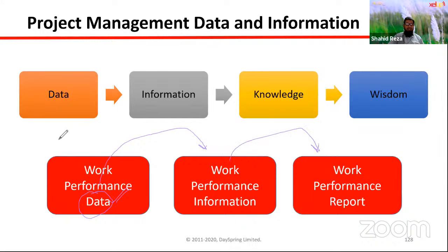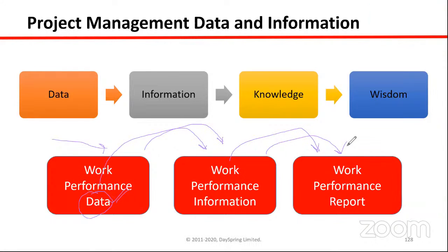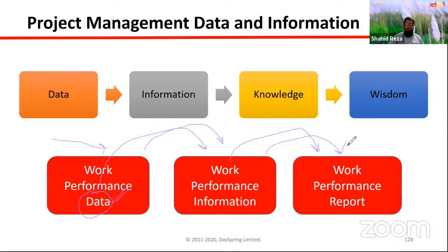And data in a project, what happens at the lower level, people focus on data. How many bags of cement were used today? How many laborers worked today? Then we make it information to communicate with our senior people. And that information also, weekly or monthly, we create reports for our higher management, for our steering committee, for higher authority or sponsor, so that they can understand what is happening in the project. So they are not focusing on data, they are focusing on report.